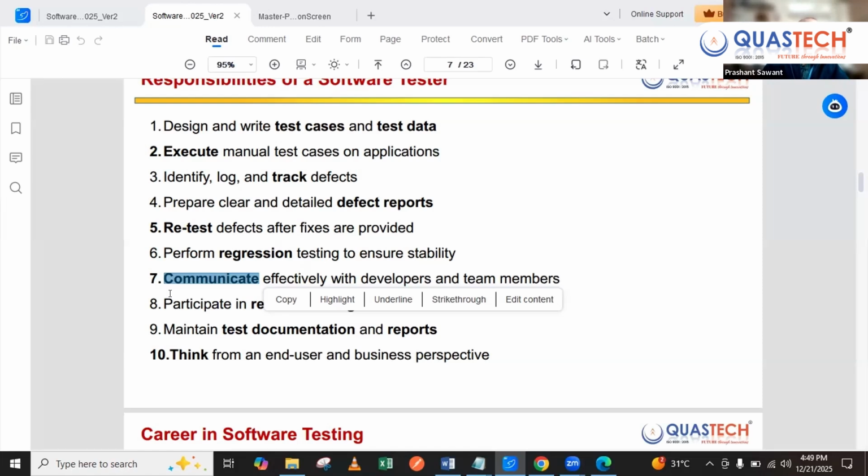If you are working under assumptions, like maybe the requirement is something like this and let me go ahead and write a scenario, no, please do not work under assumptions. It would basically lead to disaster down the line, because if you are not clear about anything in the industry, the first thumb rule is do not even start with that work. If you are not clear with the business requirements, specifications, or the designs given to you, if you are not clear of what exactly needs to be done, either partially or completely, this should be escalated and resolved, and only then should you start with your work. So communication is one of the most important things.